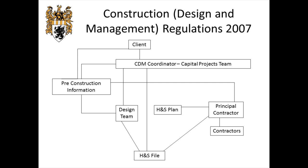The other two bits of paper are the health and safety plan — we require the principal contractor to make a plan on how he's going to manage health and safety through the project, which he did quite well, it's about that thick. And then finally we need a health and safety file, which records health and safety information that informs future construction work. So in the future, when you come to clean your windows in the new building or do any construction work on it, that's where you go to find any health and safety information.